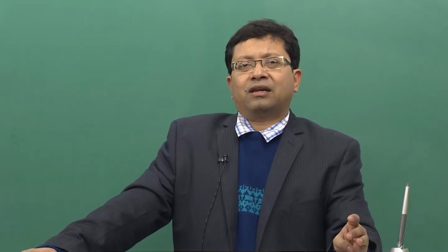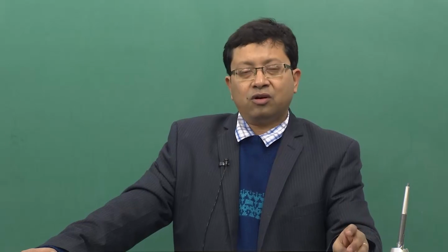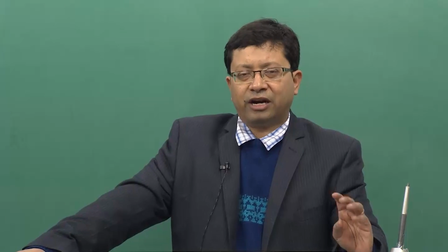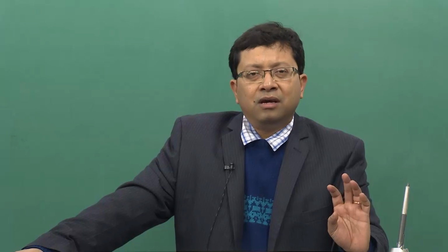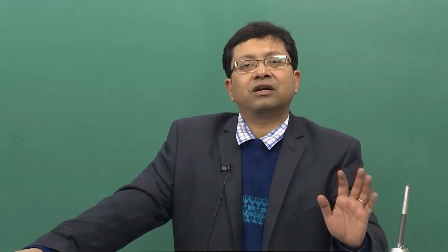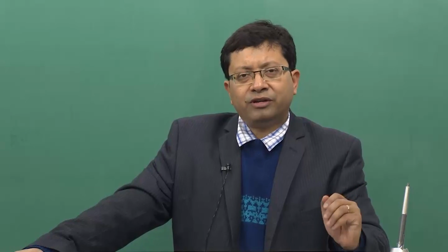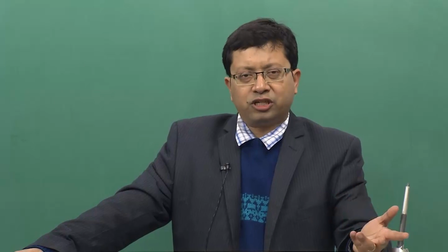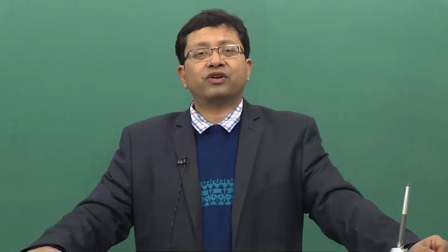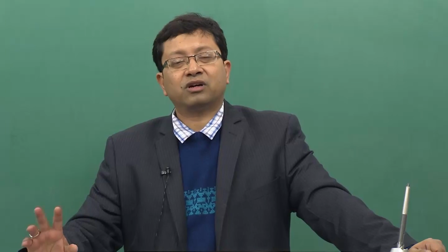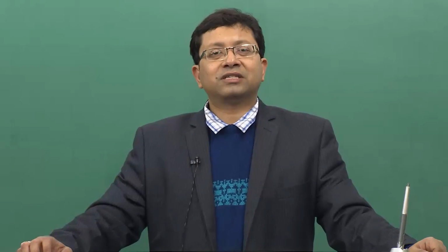Now, consider that the times taken in these three machines are T1, T2, T3, all of them probabilistic irrespective of the fact that the jobs are being done right on time. To make things simple, even though probability is a concept for the practical sense, we make the time an equivalent deterministic time. But when we try to implement that in a work schedule for the project, it may be found that a grinding work, which is a precision work, takes a lot of time. So, that would basically be a bottleneck.